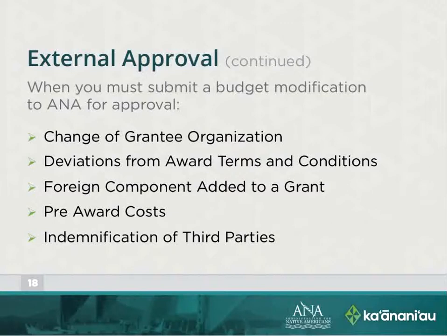And generally this occurs when, under a research grant, the grant was awarded based on the experience of the PD/PI, the researcher, and the University of Iowa houses the researcher. So then the award is made to the University of Iowa. But then if the PD/PI transfers over to the University of Illinois, and the award was made based on that researcher, then that grant can also transfer, provided that Iowa submits a relinquishment letter and the University of Illinois submits a full application to accept the award and provide assurances that the project will continue to be implemented as originally approved.